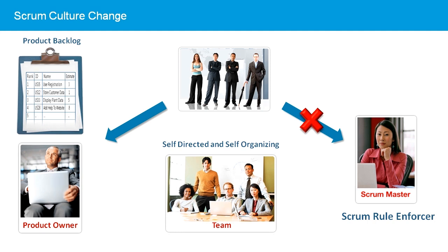Project managers can make good product owners. Interfacing with multiple stakeholders to transform a never-ending flow of change requests into a prioritized list is something the project manager can do well, and has most likely been doing in the past. The project manager, as product owner, just needs to understand they can only dictate what is worked in the next sprint. They have no authority to determine the number of items worked in the sprint, the time it will take to complete each task, or how the team creates or works the tasks to complete development of each item.